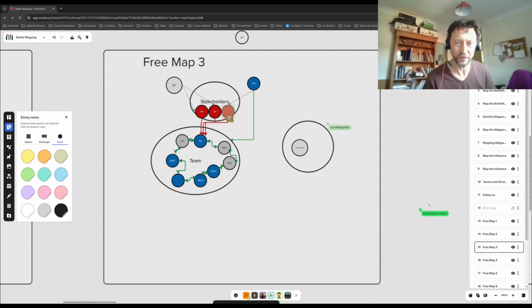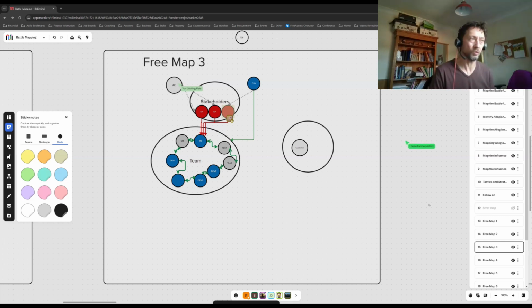So these are our 3 difficult stakeholders, and everybody else is more or less aligned in the picture, including the CIO, which was quite lucky in this case. So for the 2 stakeholders, the action was for the Agile coach to speak to them and explain that their feature would delay the product that they were very interested in getting out on time. And the 3rd stakeholder had a bit of a personality issue, and it had to be the CIO who helped to realign the stakeholder.